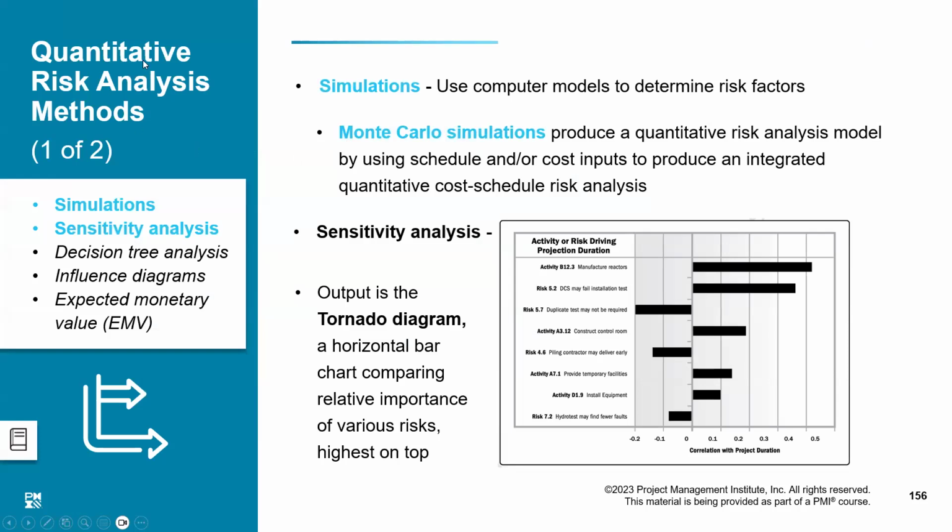Then we do quantitative risk analysis. We run simulations. We do Monte Carlo analysis, sensitivity analysis. We draw tornado diagram. There are many ways of doing the quantitative risk analysis. But basically, what we need to know is what is the total risk of the project. So we will accumulate or add up all the values of the risk in quantifiable terms, right? So that is quantitative risk analysis. And this quantitative risk analysis also happens in sensitivity analysis, in simulation, or even in a tornado diagram.